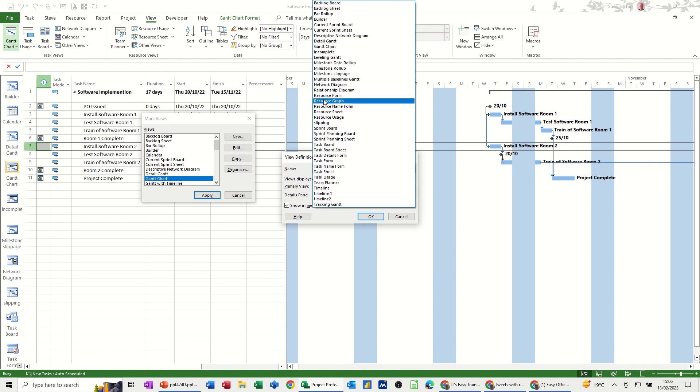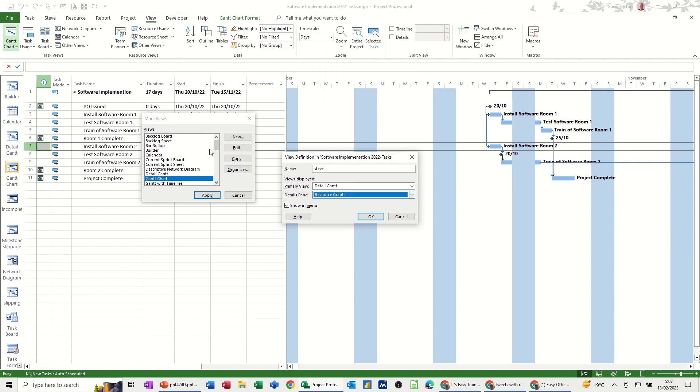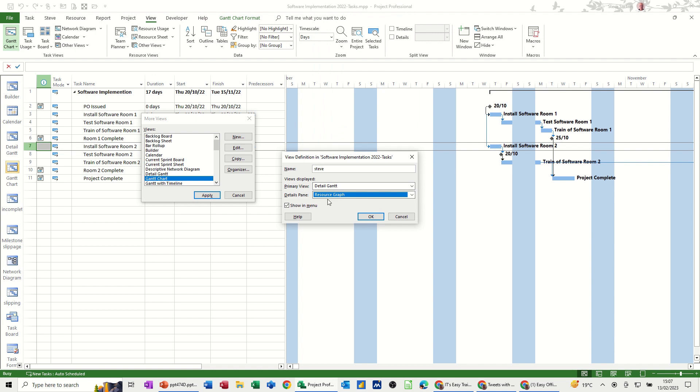Now primary view I will go for detailed Gantt and details pane I will go for resource graph because this is a view that I use quite a lot when I'm resourcing a project especially if you get the red men appearing in the indicator column which would mean that you've over allocated somebody. This sort of view will help you sort that out quite quickly.